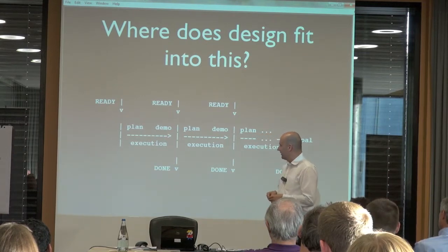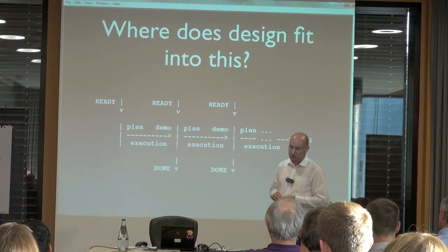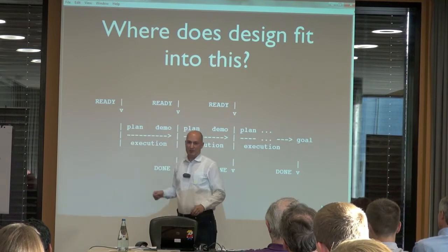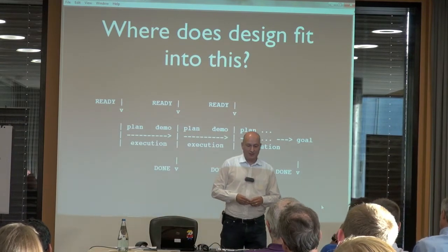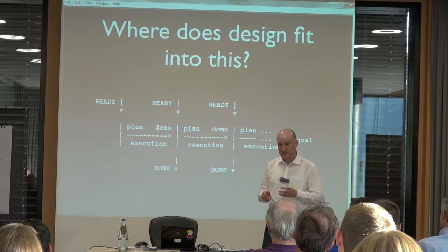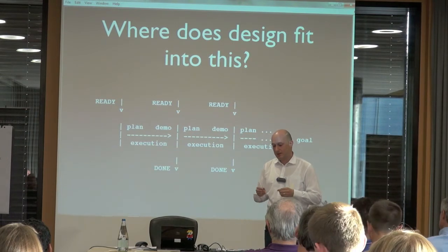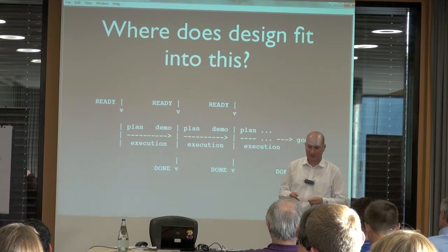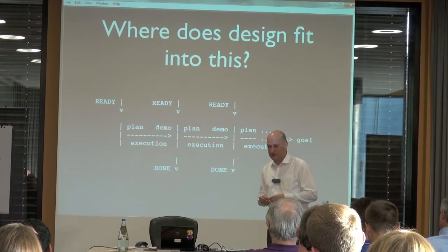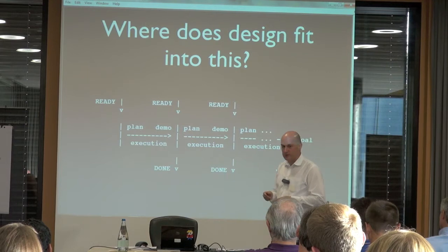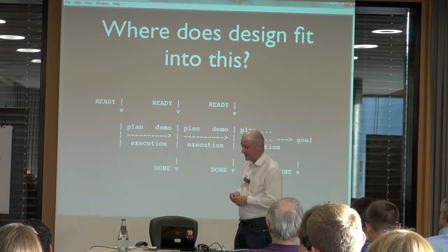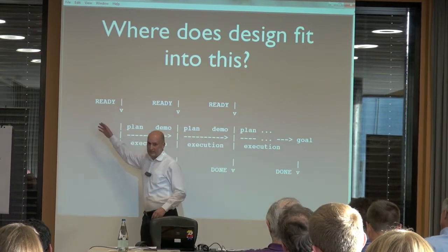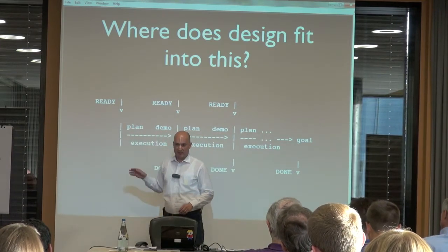And then people found out that at the other end, at the beginning, we have a similar problem. Sometimes the team pulls backlog items into the sprint, and then they are confused. It's not very clear. What exactly should they do? How is it supposed to work? What values are supposed to be shown, and so on. And then they introduced this notion of ready. That's basically done for backlog items, right?